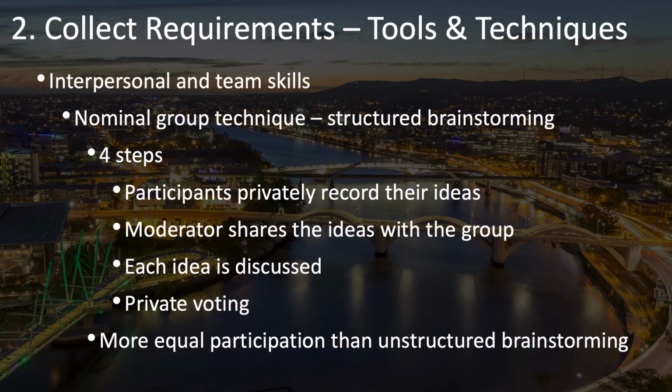This more structured form of brainstorming can be valuable to get more equal participation than unstructured brainstorming, because you may have members of the team that might not otherwise contribute as much because of some people in the room who have such strong personalities or feelings or opinions that they can overwhelm the group. So if you're concerned about making sure that everyone gets more participation and more of a voice, then you may want to consider the nominal group technique over simple brainstorming.